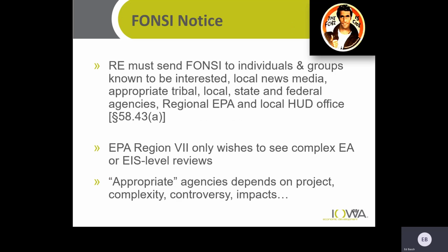Okay, there's the FONSI notice. You are asked to send, or required actually, to send a FONSI to individuals and groups known to be interested, again, known to be interested, or even if they haven't told you they're interested, if you know they are, you should do this. Local news media, appropriate tribal, local, state, and federal agencies, appropriate ones that have an interest, and the regional EPA and the local HUD office, which is us.